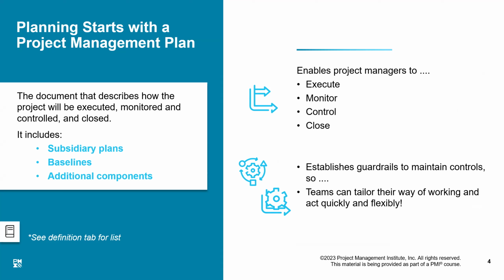Well, anyways, that is an obsolete terminology, but I am just telling you that triple constraint means that we have got certain constraints which affect each other. If we bring any change in one area, the other area will also have some impact. For example, if the scope of the project is changed, it may affect the time and cost. These are the three basic constraints. They were considered the three basic constraints, and therefore they were called the triple constraint, right? But there is a fourth one also, which is called quality.